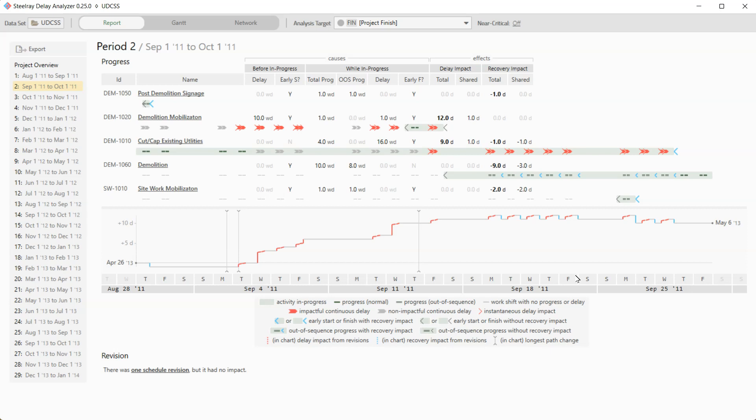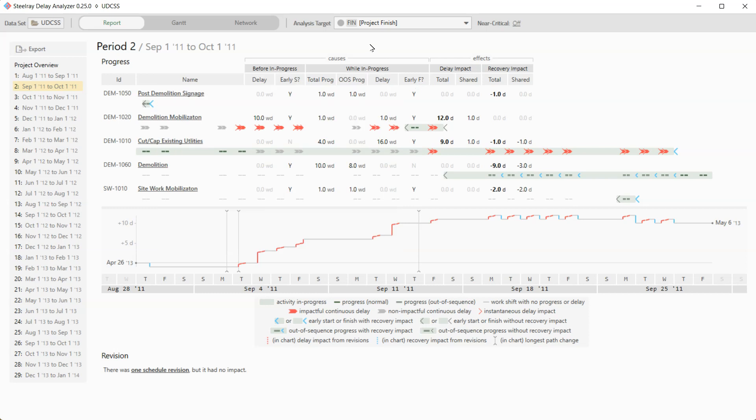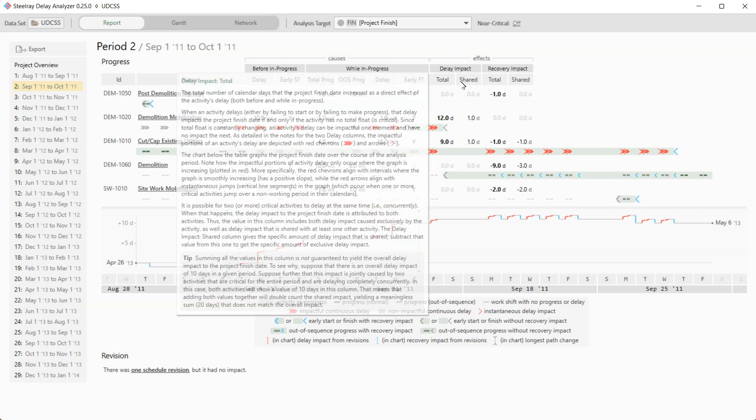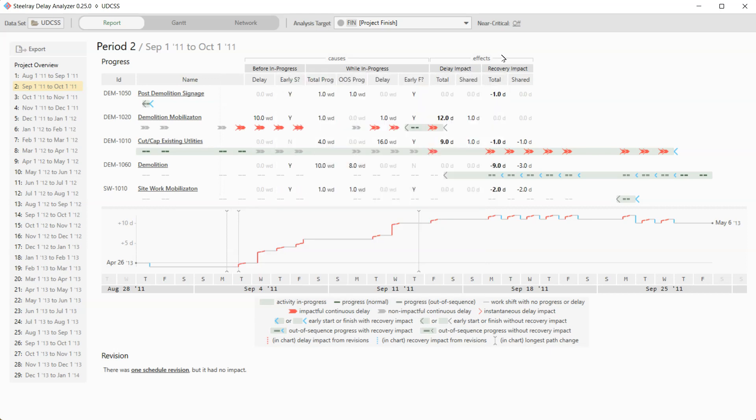That's basically what you need to know. So in this table, which really represents what you would come up with when you did a delay analysis on this period, you've got two groups of columns. The first columns up to about this point represent the causes, meaning what actually happened that caused delays or recovery. And the last four columns here, those represent the effects, the impact on the finish date.